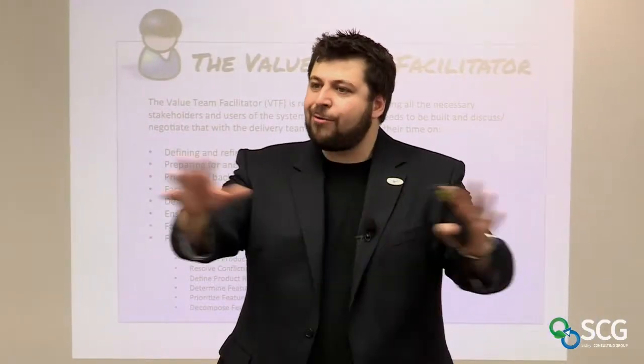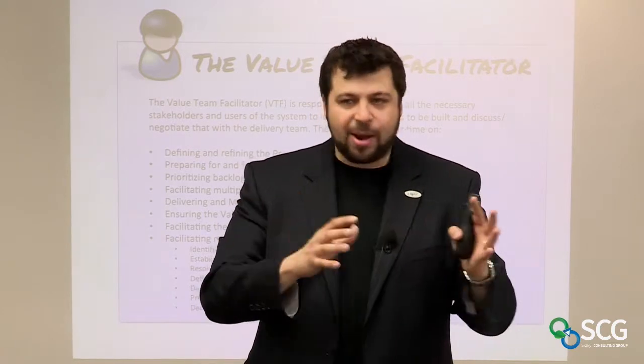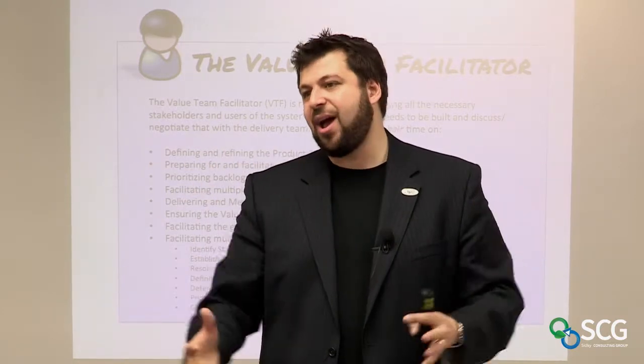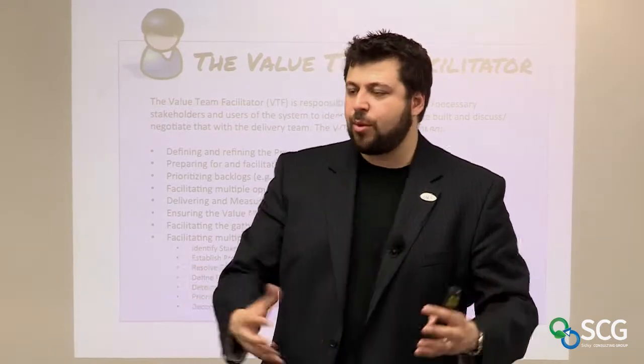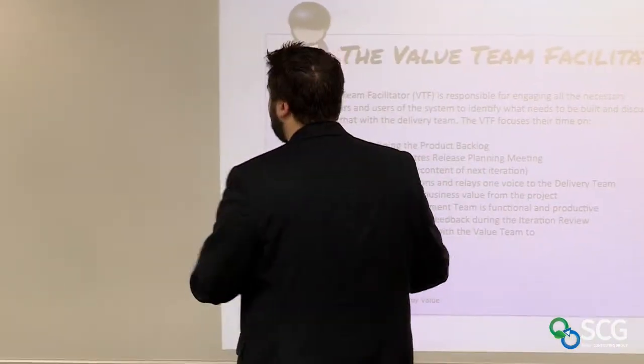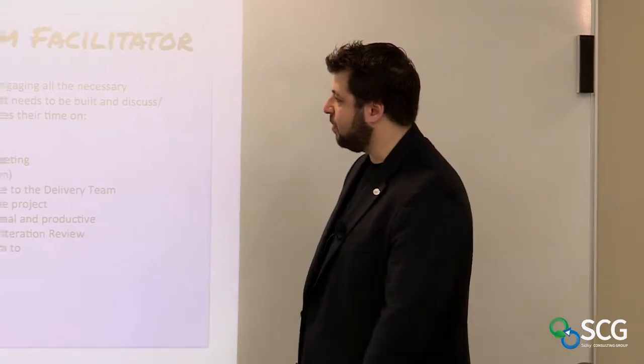That, listen, if you're a value team facilitator, use your knowledge to ask powerful questions of the group, right? Ask the powerful questions, but let the group decide. And then commit to that decision along with them, turn around and speak on behalf of the business to the delivery team. It's a subtle shift in dynamic, but it makes the biggest difference.